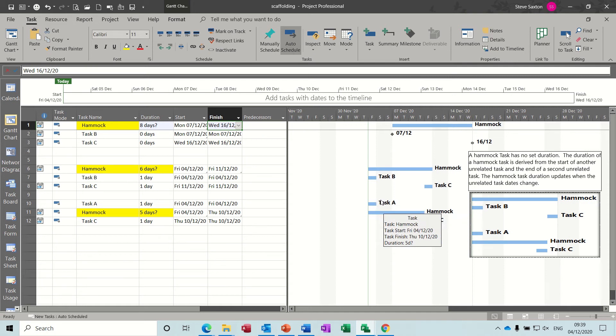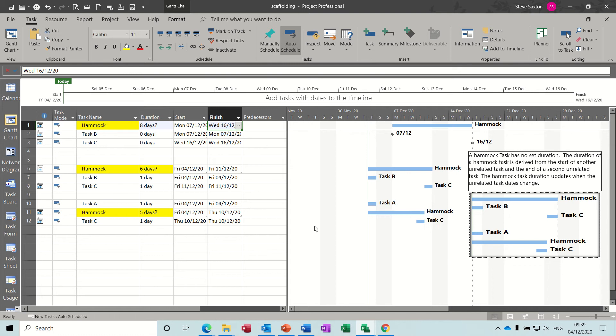This is quite often used to show costs, or in this example I've called this file scaffolding. How long does the scaffolding have to be up for? Don't know, depends how long the job starts, how long the job is. So how long does it take from the start of this task to the finish of that task? Whatever that is, that is the length of time the scaffolding would have to be in place.